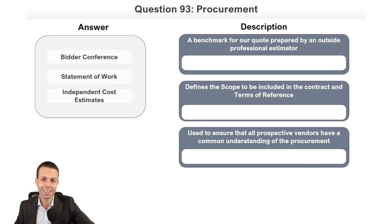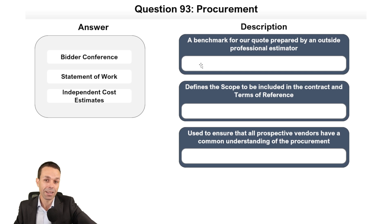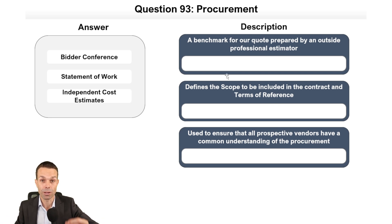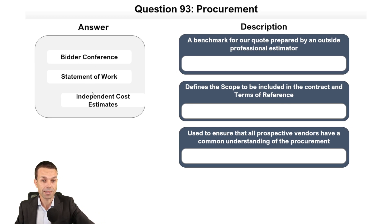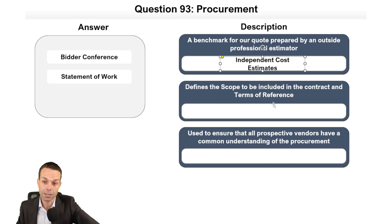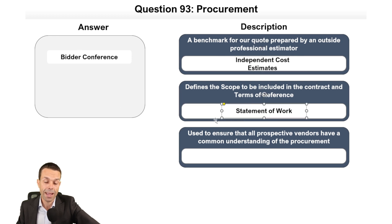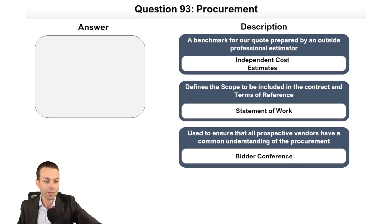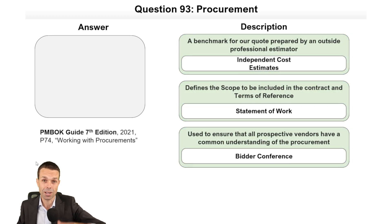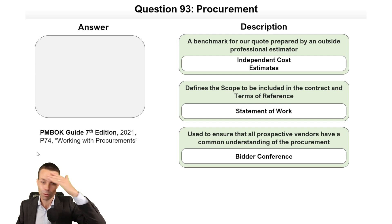Now procurement: a benchmark quote prepared by an outside professional estimator, or information from commercial databases or consultancy firms like KPMG or McKinsey, all count as independent cost estimates. Defining the scope and terms of reference for the contract is the statement of work. To ensure all prospective vendors have a common understanding, we hold a bidder conference so no one gets preferential treatment. That's verified on page 74.